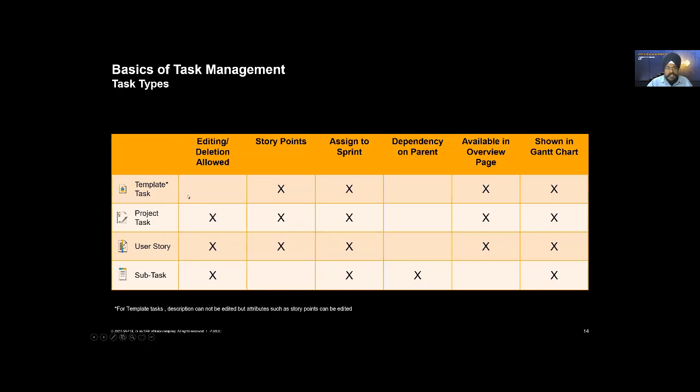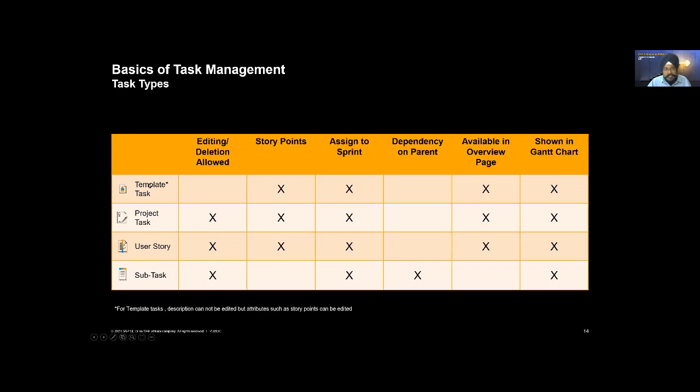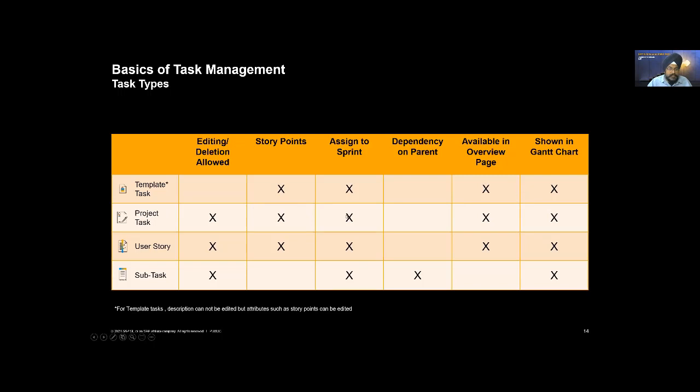You as a customer decide if you want to use both of them to keep things clean, which we recommend, or just use one of them. If you don't like the term user story for whatever reason, you can always just use project tasks and things will still work. And subtask is nothing but a child of any of these entities. This is much easily understandable by this table comparison. When you have a task type, what can you do? Where is it available? All of these tasks can be put in a sprint, but subtasks do not get story points. Story points, if you're familiar with agile methodology, is a way to gauge relative complexity or effort.